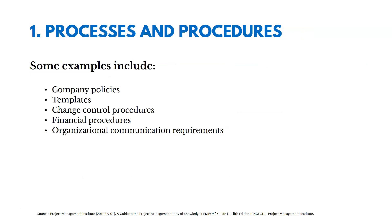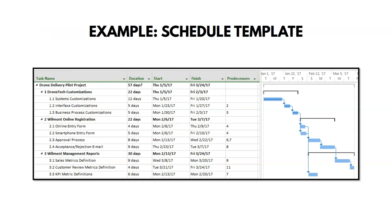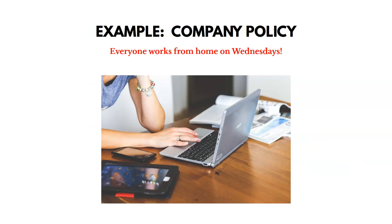Some of the processes and procedures could include things like company policies, templates, change control procedures, financial procedures, and organizational communication requirements. An example might be a schedule template — something the organization has asked all project teams to use. Another example could be company policies about working from home. Maybe everybody on Wednesdays is supposed to work from home — that certainly could affect how we manage our project. We can't have customers coming into our office on Wednesdays because nobody's going to be there.